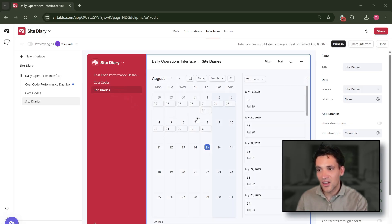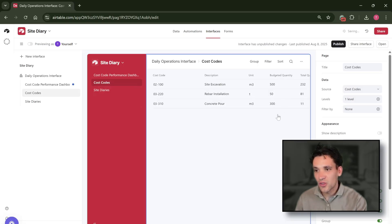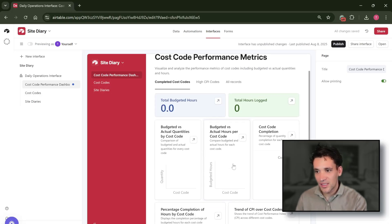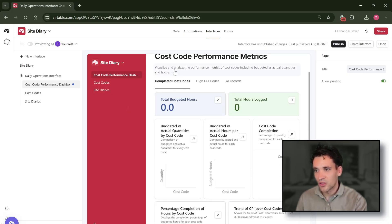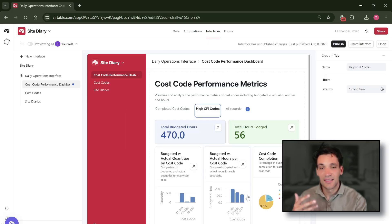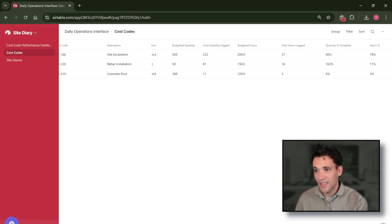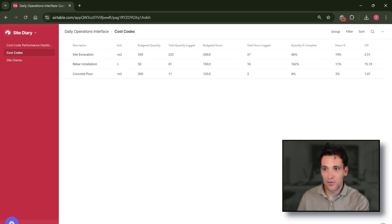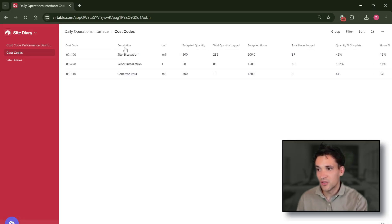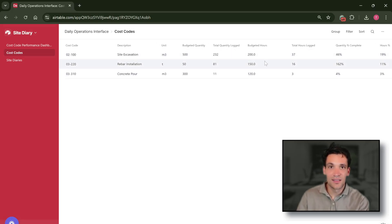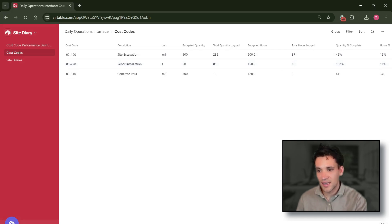This has an entry called site diaries where we can see diaries created on each day. It shows our cost code table and then it shows a very simple dashboard with some key metrics. So for example, for our cost codes, all we're showing is a table which shows the exact information in our record which shows the three cost codes, the budgets, the quantity completed, the budget hours, the budget hours completed, and calculates some key metrics.